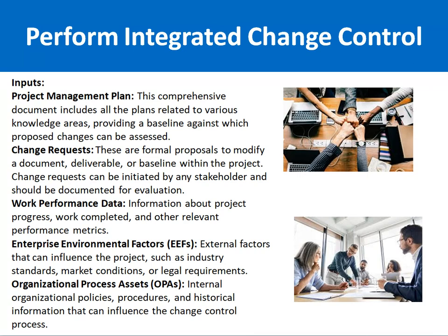Now, the change request is basically a formal proposal. You can assume that it's a Word document, for example, in which all the changes to the deliverables or baseline of the project are mentioned. A change request can be initiated by any stakeholder and should be documented for evaluation. Normally changes are initiated by the customer, who sends an email or a document saying he needs these modifications.